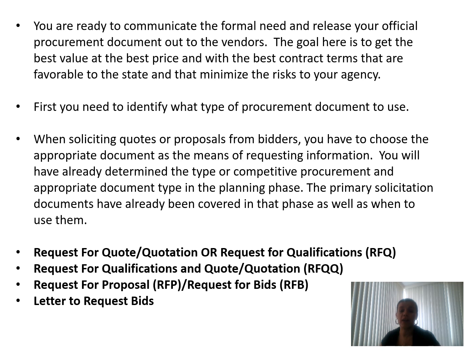First, you need to identify what type of procurement document to use. Remember that we mentioned before that if you need to get more vendors to start your research process, you will go through a request for information. But if you just want a price for something specific, where you are very clear what you need and the scope is very clear, you will go directly to a request for quotation.